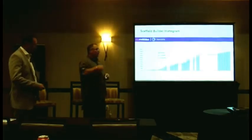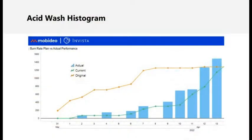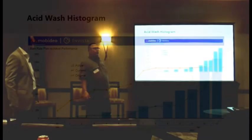Now the next slide is what you don't want to see. But it painted a picture to where we were 4 days into it, and we noticed our acid wash contractor was not cutting the mustard. So we got on the horn, got on the hook, found another contractor to come in, and they got there on day 11. So day 11, day 12, and day 13, they finished out all the scope that we needed done.